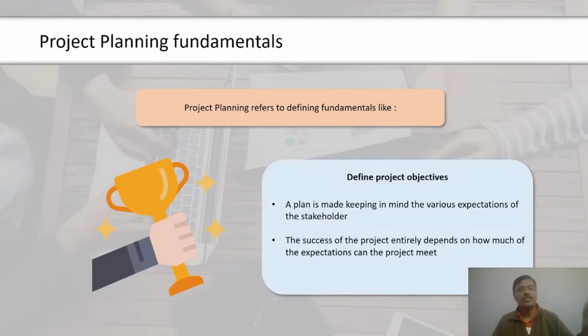Now the fourth step, now it's time for us to add description to our Gantt chart. Instead of this 1, 2, 3, 4, 5, we will put task 1, task 2 and the subtasks. So what we will do is, we will again go to that box, we will left click on the Gantt chart, select the select data option, and then we go to the start date. Here, we will select the edit option. In the edit option, we will select all the tasks and click on OK. Now we can see all the tasks are aligned towards the left of the bar chart. As we can see, this is a bar chart or a bar graph and not a Gantt chart.